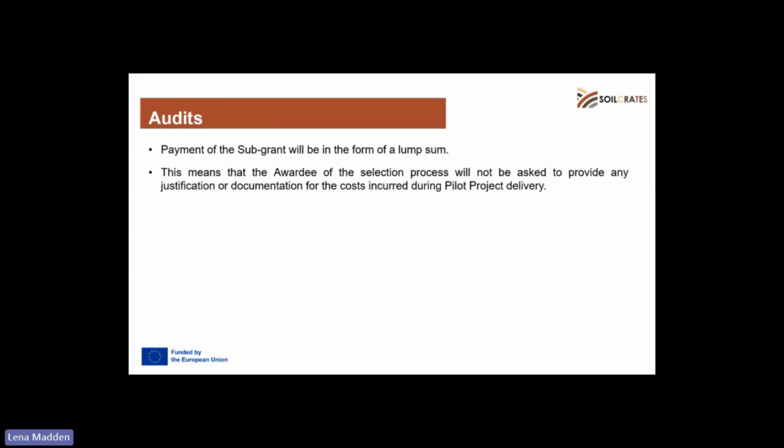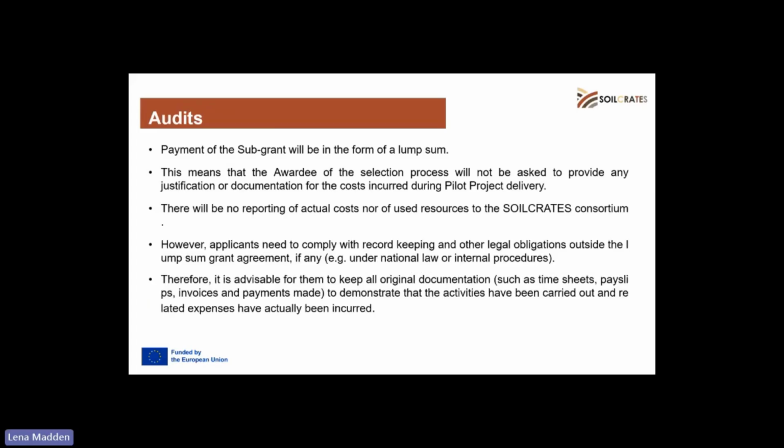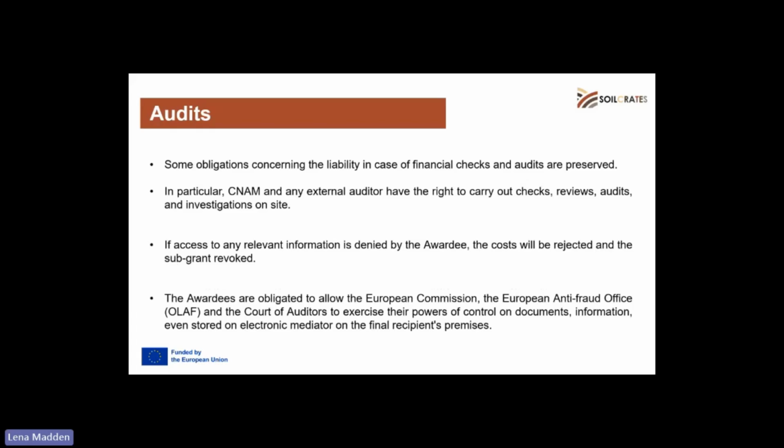Then participation, what is audit? So it's a lump sum project. Whatever is in your budget and whatever is agreed is going to be given to you. Okay, but Horizon or the Mission could have spot audits. I don't envisage that happening, but we recommend if you buy any material, please keep the receipts, and do the timesheets, pay slips, and invoices, etc., just in case, for the duration of the project. Just have a folder for it.